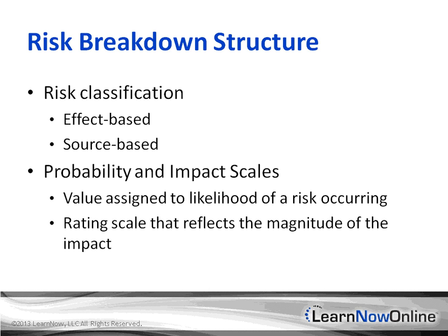They can be ordinal scales using values of very low, low, moderate, high, and very high. They can also be ordinal scales using linear or nonlinear numeric values. Often impact scales use both methods. To improve the integrity and quality of data and make the processes consistent and repeatable, organizations typically develop definitions for each value to help the risk management team assign each risk impact score consistently.